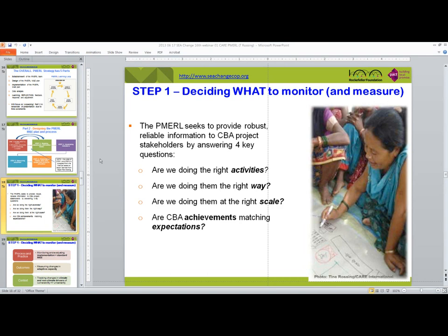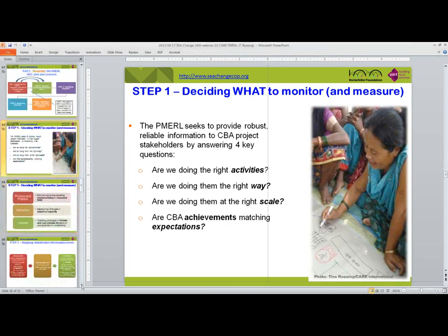It's really interesting because, as I was talking about, the way we do it is through this visualization process, where you come up with some outcome statements, what you would really like to see in the future. And then we use those to work backwards. So if you would like, for instance, increased forest cover or forest resources, you ask the person who came up with that statement, if that is what you would really like to see, what is the current situation? And then you can say, this is the issue, or that is wrong, and based on that you create your baseline. But a lot of times it is very subjective. Based on that, you can come up with some indicators and create some milestones.